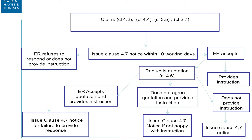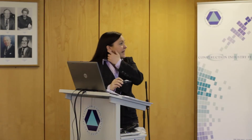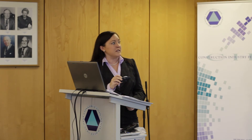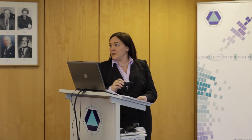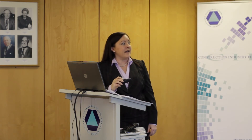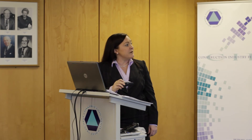Alternatively, your ER might accept your claim and, as per clause 4.6, request a quotation. He may accept your quotation, provide an instruction, and all is good - you continue with the works. He may not agree to your quotation and make his own assessment. If you don't agree with his assessment - if he's not giving you enough time or enough of a price adjustment - that's a claim again, so you need to issue another letter. If he gets your quotation and doesn't provide an instruction, you have a claim again.